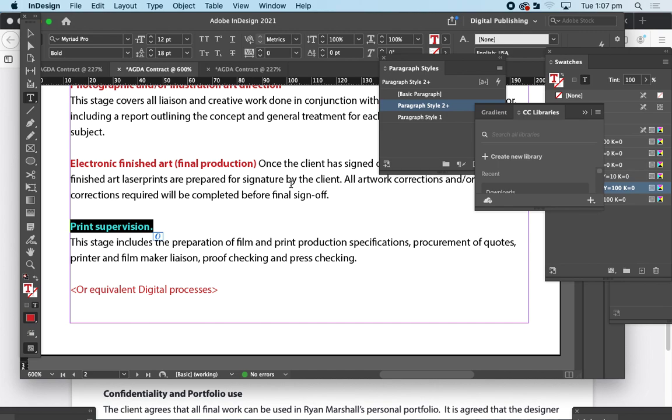Whatever time the client wants it delivered, you want to go back 2 weeks to get the printing deadline. So you're setting that up at the beginning of the job. Once it's clear from all your discussions with the client, they've told you how many they want printed. That should all be coming out of those initial consultations with the client. So everybody's really clear what's involved, how many need to be printed, etc.